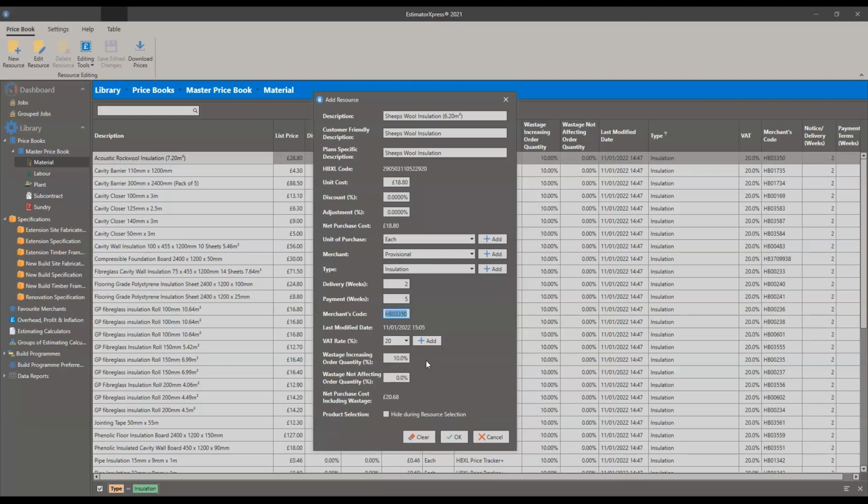So that will appear on any kind of material that is loose or comprises lots of different items. So bricks, blocks, tiles, sand and aggregates and such like have a 30% wastage, because if you pour it onto a driveway, you're never going to get it all over the trowel. Some of it's going to wash away, some of it's going to get left in the mixer, some of it's going to get left in the bucket and washed out, and most of it's going to get onto the trowel and fall off or get tamped off on the scaffold, much to the scaffolder's displeasure.